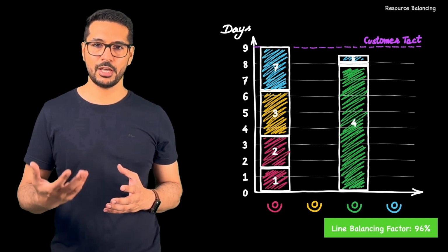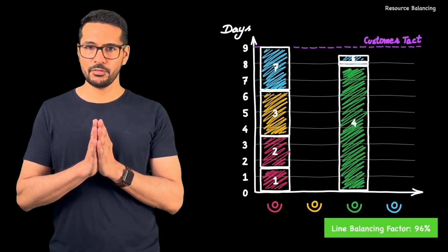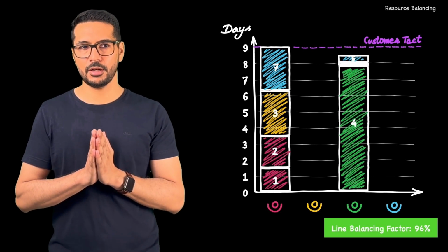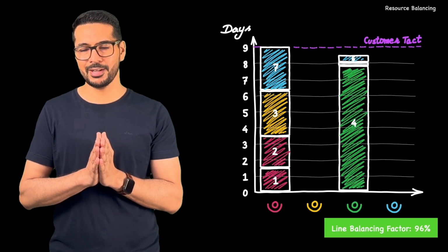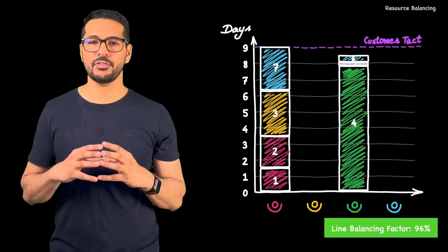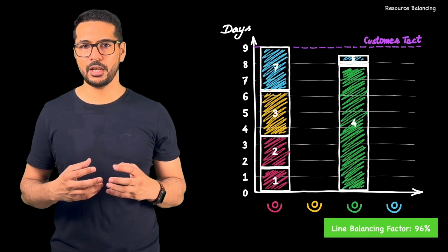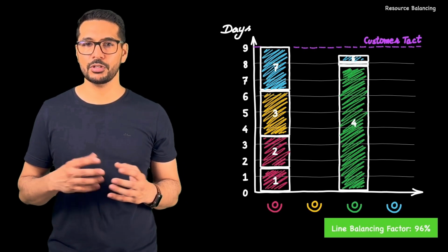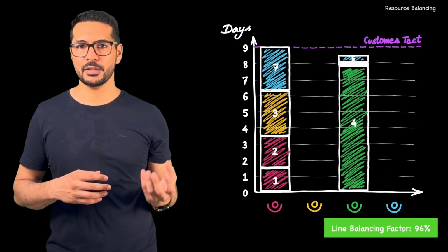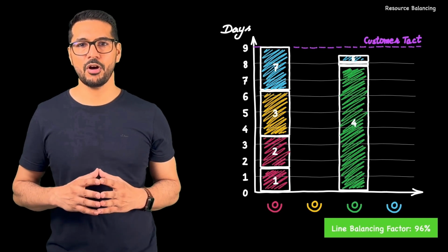Now we are utilizing. But here we have a small issue: we see employee number 1 is still not able to 100% meet the customer requirement, because the customer requirement is every 9 days and it is touching. So we don't have a buffer of 10 or 15% in case some tasks have some difficulty and cannot be completed on time, or we couldn't receive feedback from any other department, or something goes wrong. So we need 5 to 10% of buffer.